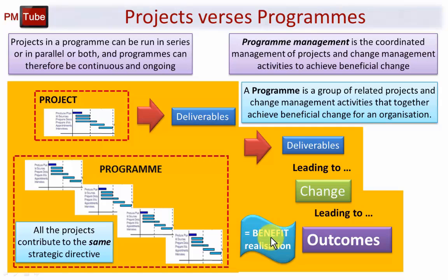From the work done in the previous module, we know that typically a standalone project does not hand over all of its deliverables until the end, and therefore in a project, the benefits that are realized are nearly always after the project is finished.